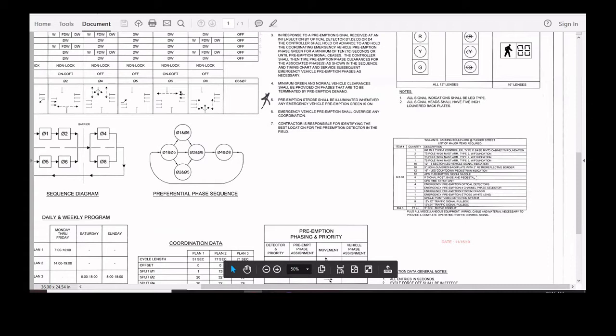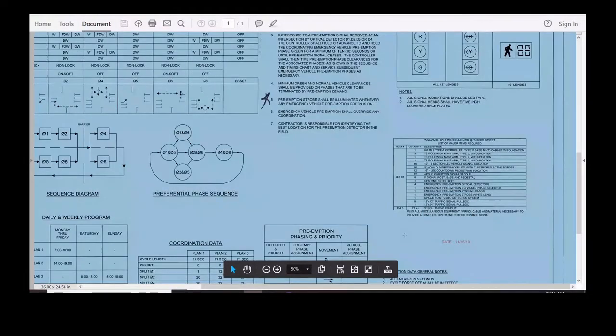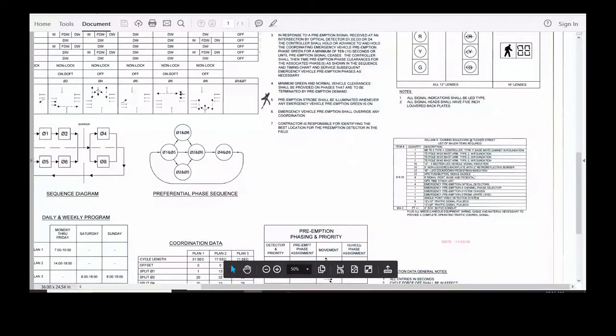major items list. You'll see over here, list of major items, and it'll break down the quantities of each item. So in the spec, it'll say item 816-03. If you went into the specification book, it would say 816-03, and it would start listing this stuff. Just for example, the top line, TS2 Type 2 controller, Type P base with cabinet with foundation.